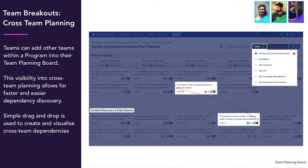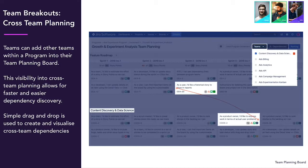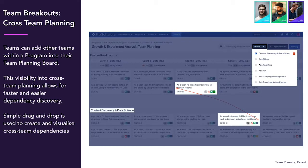Next, teams can work with each other to map dependencies. We call this cross team planning. If one piece of work relies on another piece of work, simply drag and drop the issue onto the other issue. It will create a coloured dependency string automatically.